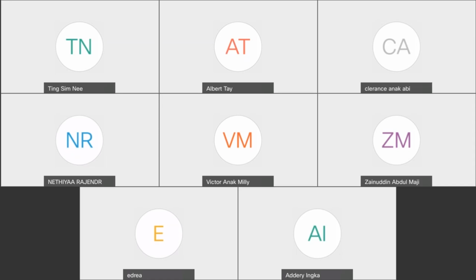Let's say you're producing 100 products. At which point are you going to take one out for checking, for example, number 30 or number 50? And then what sort of measurement, what sort of characteristic, what sort of rubrics, what sort of metrics are you using for the final monitoring and checking? So you've got to plan that. When you plan to check, you are actually doing QA.